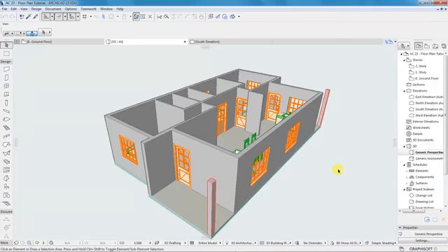Let's say you are designing for a client, and at this stage they wanted to know how much their house is going to cost. Let's say someone inquired how much they will require to just build the walls only. If you gave a floor plan to a quantity surveyor, they will be able to come up with the quantities of the required construction materials, and then they will put a cost to that.